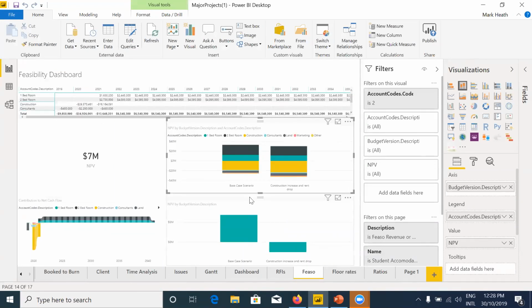And you could change one at a time, and you saw how quick that was. Change one at a time, snapshot it, do 5 scenarios before you refresh your Power BI, and you then get 6 on the screen, and then just start to see how sensitive they are to changes in assumptions, and then align that to how confident you are in your assessments of those variables. And so, yeah, one screen, one set of variables, punch a few numbers in, hit save, and you've got yourself a feasibility analysis that does try to remove the black box.